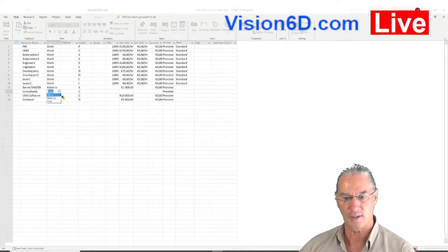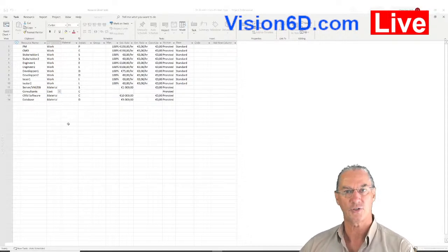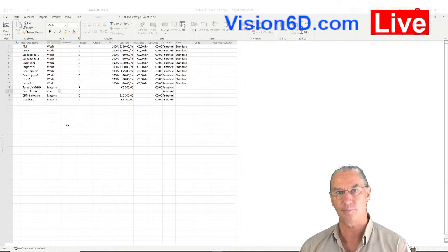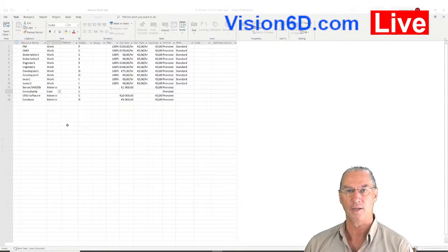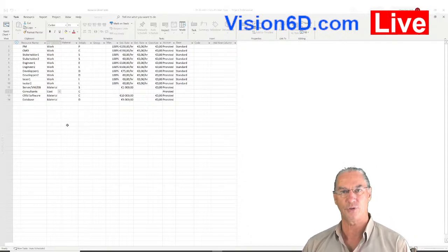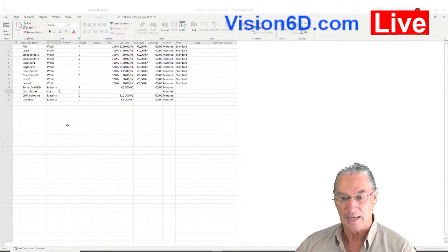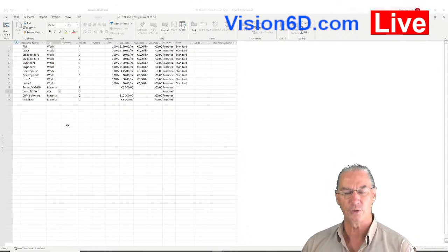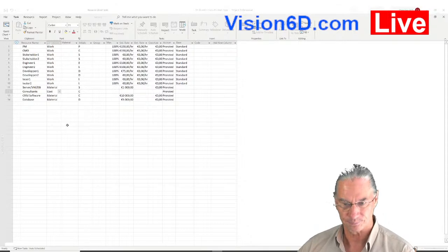So I'm going to say that the consultant is a cost resource, because I'm not going to deal with how many of them are coming that day. Maybe the next day one more will come, the third day another one. I don't want to. All I want to know is that it will cost me 5,000.